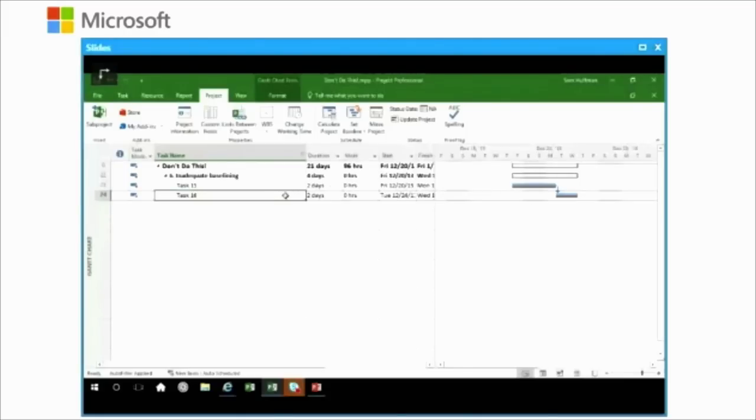Well, things happen, and we can wind up with a modified schedule. So, for example, durations can change. Here's one. We'll change it to 4. And instantly, we see that push. We see that the predecessor pushed the successor out in the timeline. And the larger the push, the bigger the difference between what we wanted to have happen, that which is here, the baseline, and what is currently happening. So this pushback.